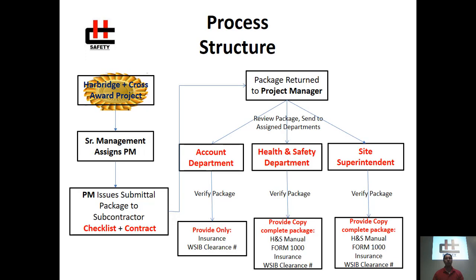When Harbridge and Cross is awarded a project, senior management will assign a PM to manage the day-to-day operations. The project manager is responsible for issuing the submittal package to the individual contractors. Now, this submittal package is going to include the health and safety checklist and the contract itself.